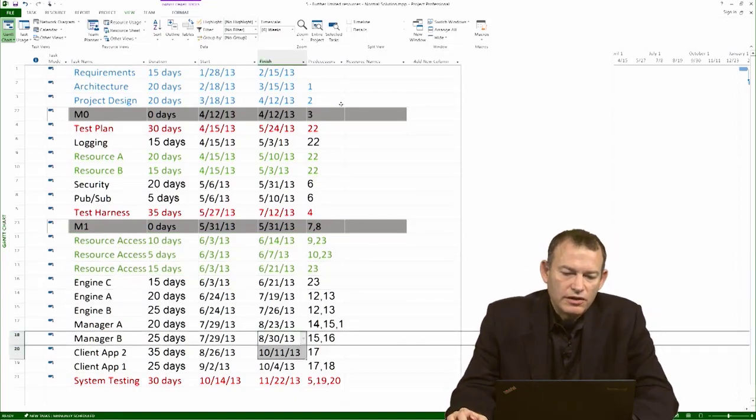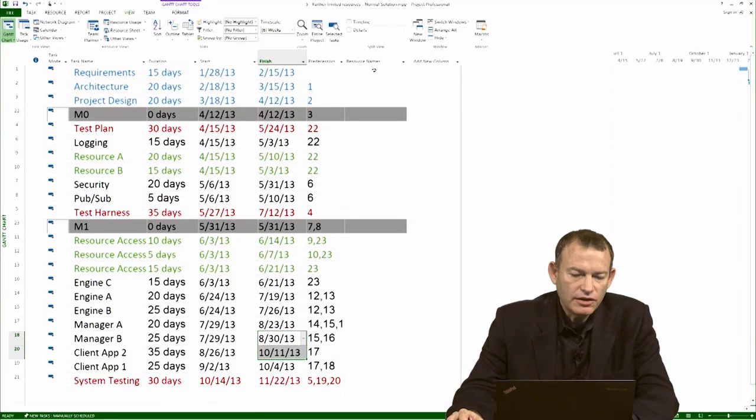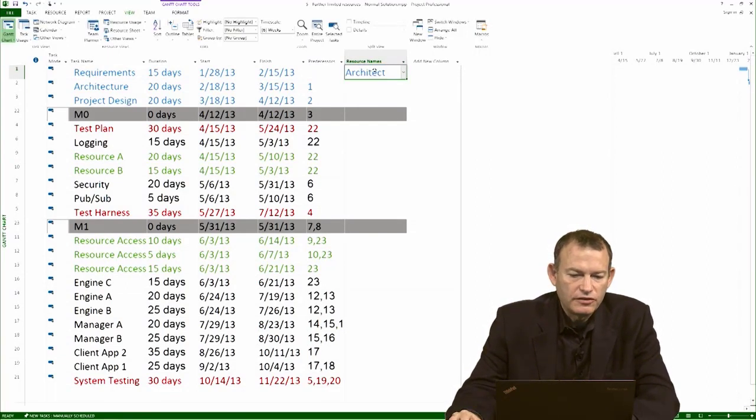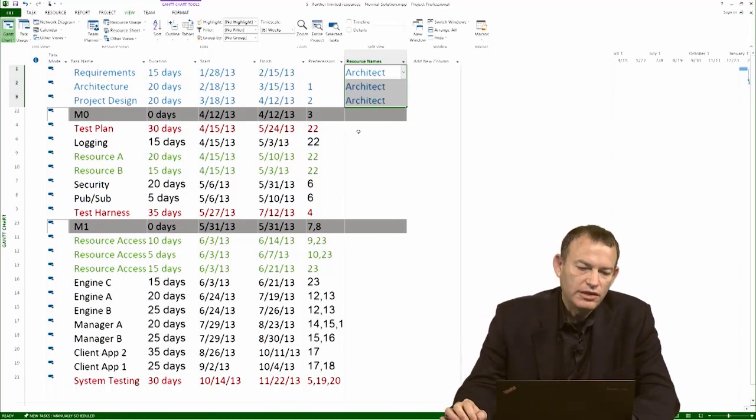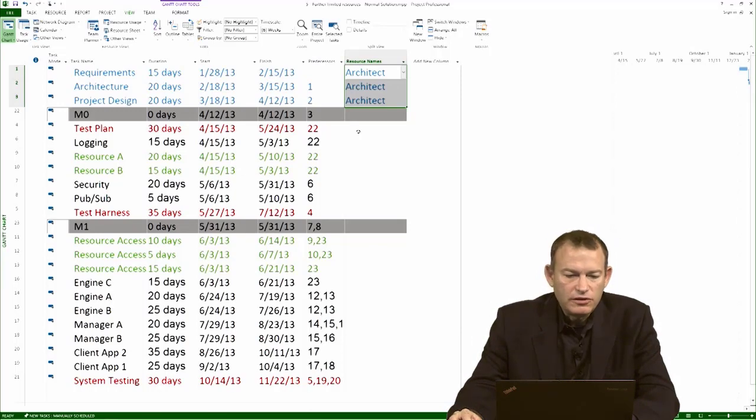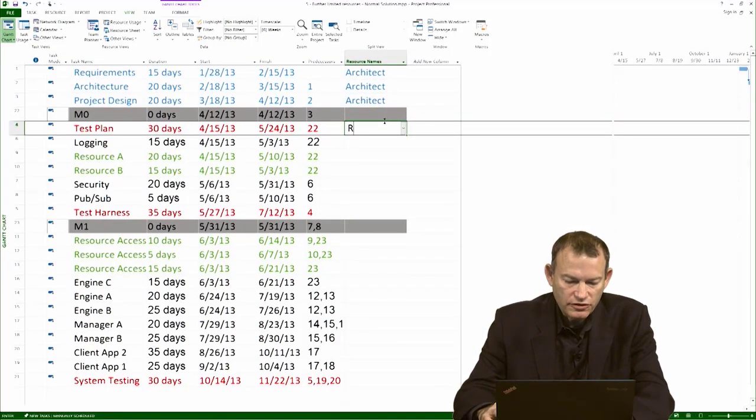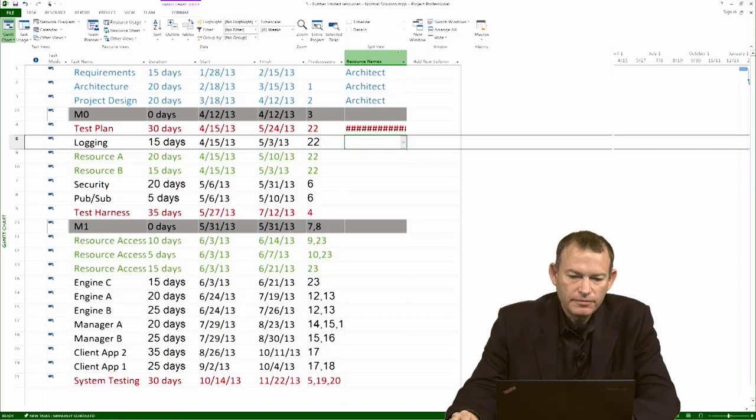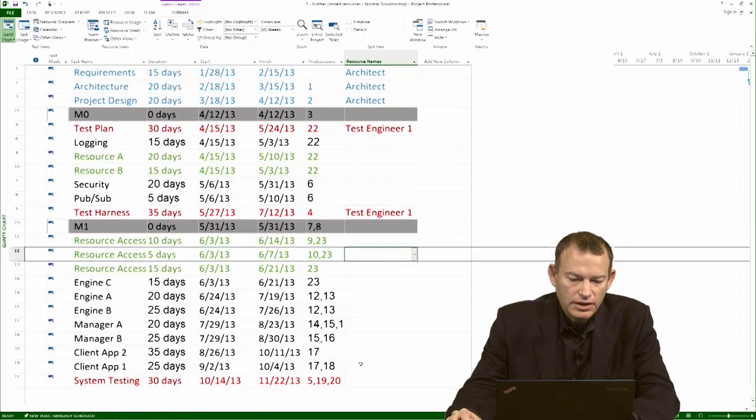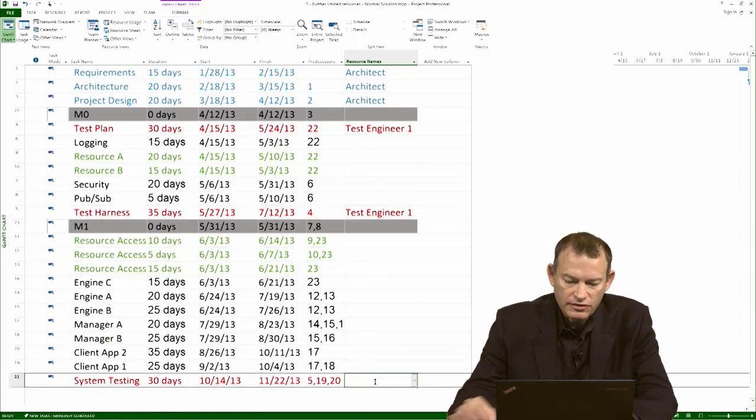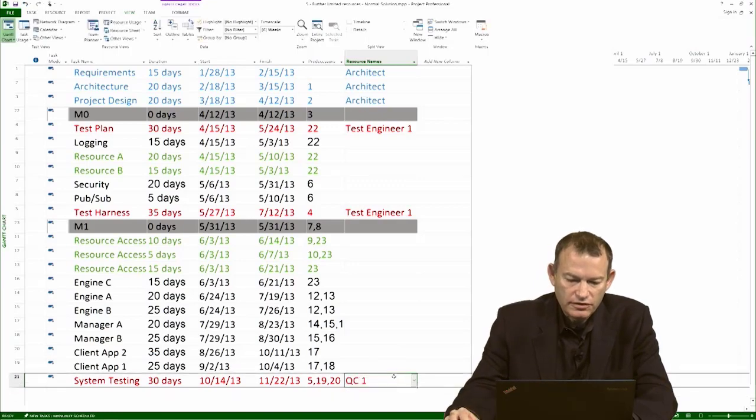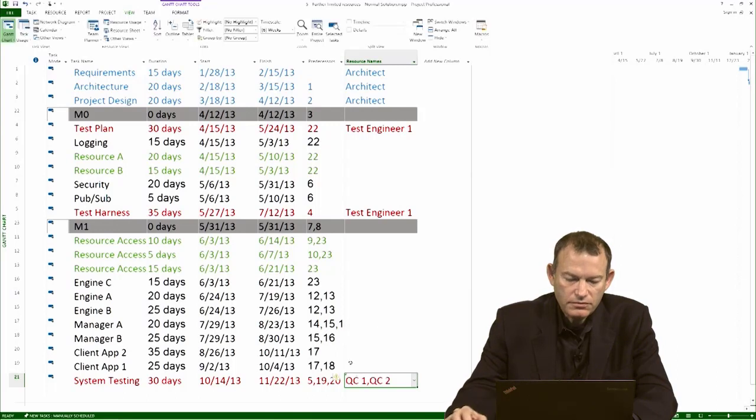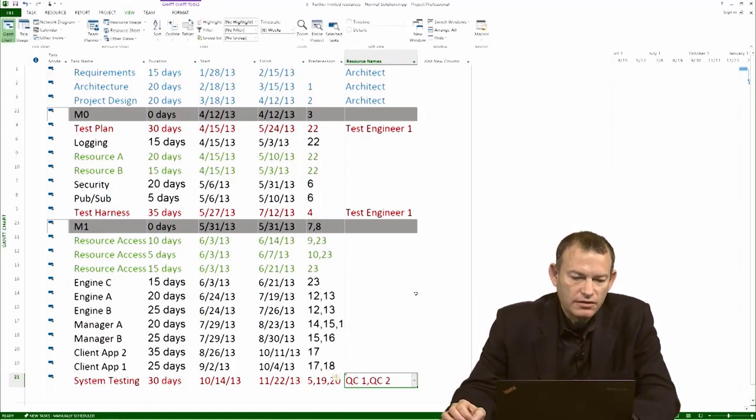Whenever you assign resources to a project, you have to follow your project's planning assumption. In this case, we assume that an architect is going to do the first activities in the front end. So, we assign the architect to all of them. Whenever you're doing assignment, do the easy things first. And so, it's also easy to assign a test engineer. And I'm going to assign a test engineer over here. And also over here. Also, according to the planning assumption, the system testing activity is done by quality control testers. In fact, two of them.